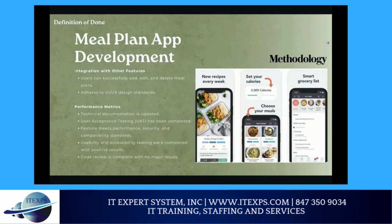To define or have a definition of done for the meal plan app development, we considered several key criteria that must be met for project completion. These include the successful integration of core features such as adding, deleting, and editing meal plans. Additionally, performance metrics were implemented and all technical documentation updated.